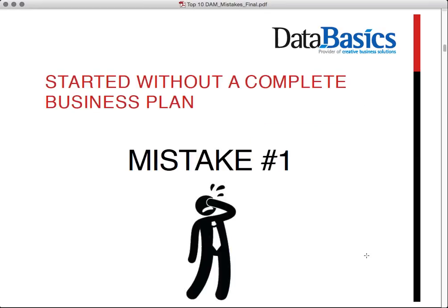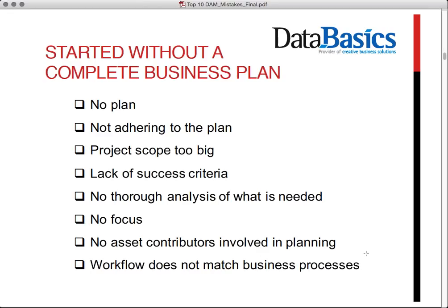So the number 1 big winner by far, started without a complete business plan. And I must say, this was quite interesting for me. As I said, we talked to 3 major corporates. There were half a dozen major government departments, and I had a range of different people, quite senior in the project, who just told me that they started without a complete business plan.